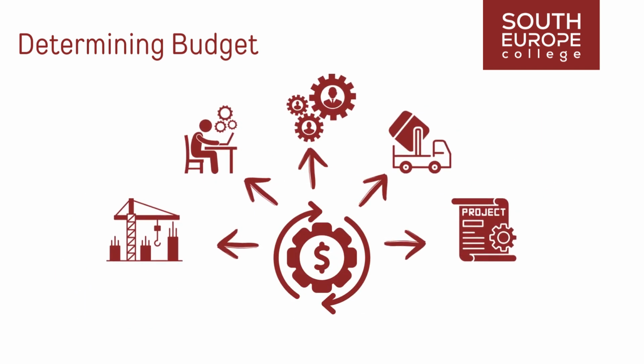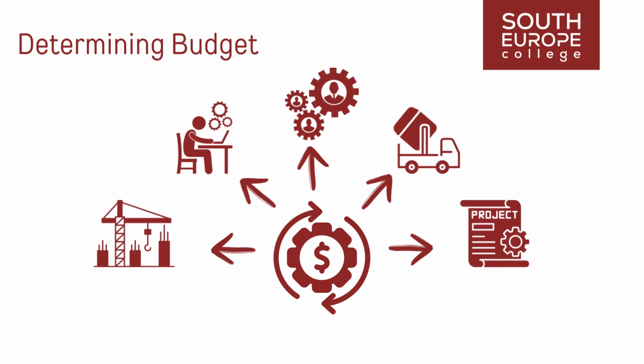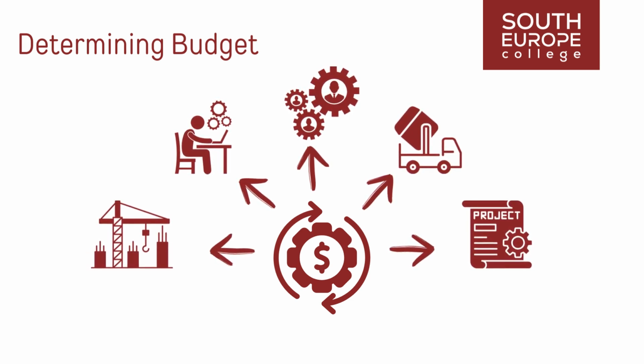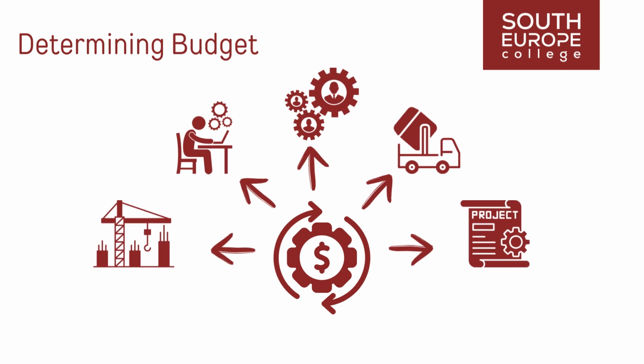A project budget encompasses all the authorized funds allocated for the execution of the project. The cost baseline represents the approved version of the time-phased project budget, inclusive of contingency reserves but exclusive of management reserves. This establishes a comprehensive financial framework for project execution, facilitating effective monitoring and control throughout the project lifecycle.